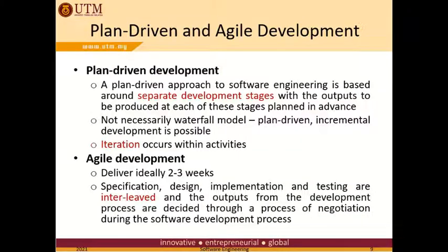In practice, plan-driven processes are often used along with agile programming practices, and agile methods may incorporate some planned activities apart from programming and testing. It is perfectly feasible in a plan-driven process to allocate requirements and plan the design and development phase as a series of increments.